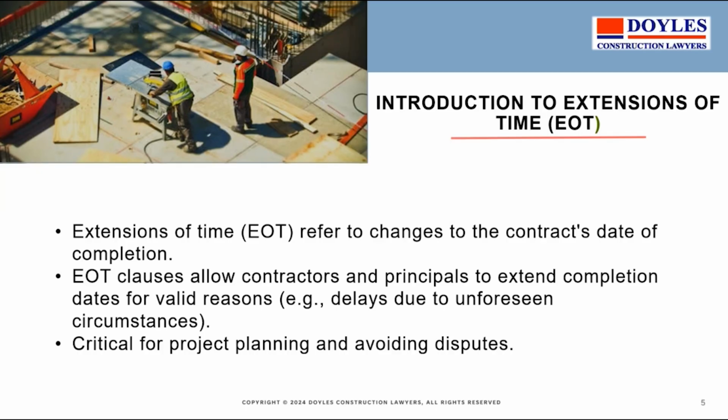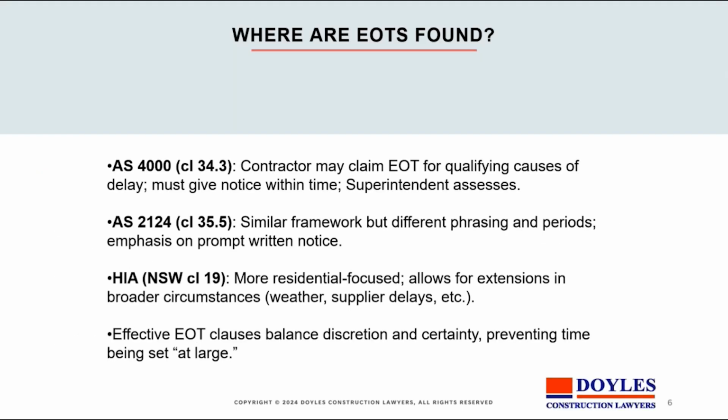The EOTs you'll find in standard contracts are found in various spots. AS 4000, and you must give notice within time. That's a feature of delay clauses. AS 2124, similar situation. The HIA contract allows for extension in broader circumstances than those other clauses. And an effective EOT clause balances discretion and certainty, preventing time being set at large.